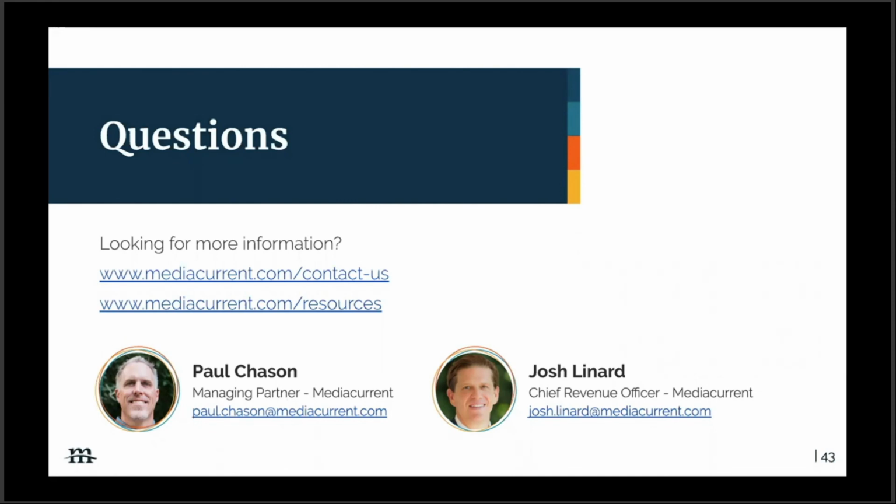Yeah, we have another question popped up. How successful have you found working with milestone payment fees? Yeah, our success with that type of structure has been good. It's positive. The great thing about it is there's less risk for both parties up front to make a large commitment. The agency or the implementation partner doesn't have to make a large team commitment for months and months. If it's a really big project, we're talking year long, and the buyer doesn't have to do that either.